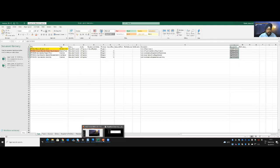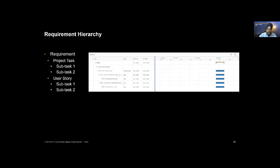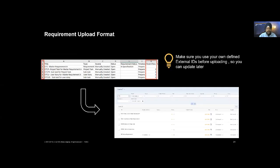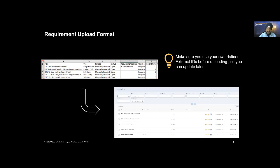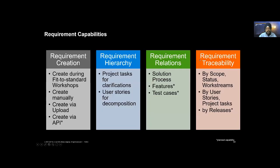If you upload the sheet with external IDs, then this will try to update. If you do not have this maintained, it will just add new. So it's very important to understand how this works. Do not worry - no details will be lost because whatever I told you is documented nicely in blog posts that are also shared shortly. For those of you working with SAP Readiness Check, this is really something very important. We now support the format. Readiness Check has a sticky option called Download to SAP Cloud ALM Extract. We can extract data from Readiness Check and upload that to Cloud ALM. In that case, the external IDs are generated by Readiness Check itself. But in all other cases, you generate your own external IDs.